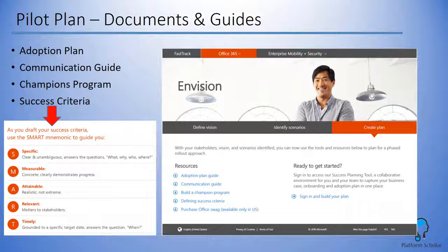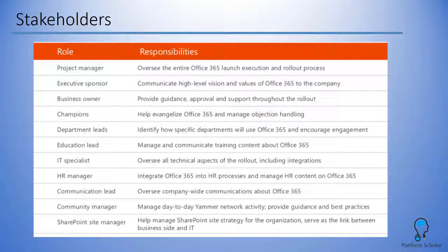Defining success criteria will be the basis for your test plan. The recommendation here is to use the SMART acronym to picking well-defined success criteria. It should be specific, measurable, attainable, relevant, and timely. When it comes to identifying stakeholders, you should try to assign each of these roles to an individual or group of individuals, even if it means granting someone more than one stakeholder role. These people should be aware of the project as well as the expectations for what they should be doing.